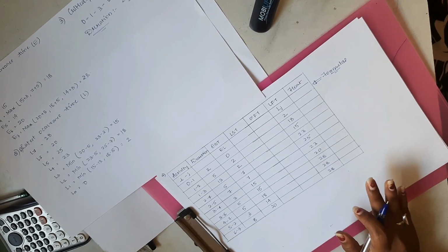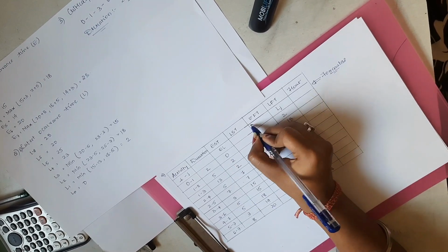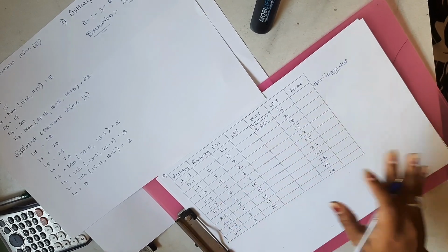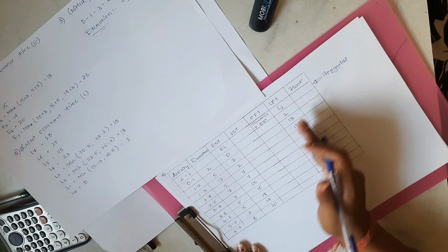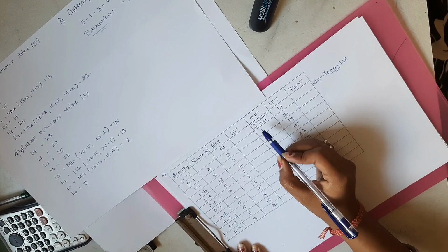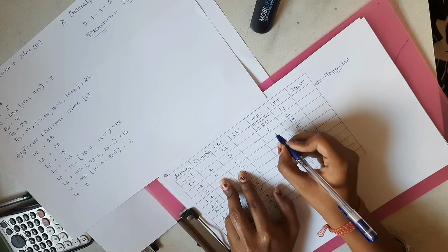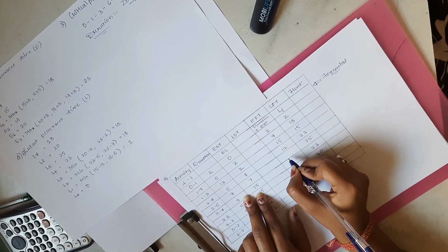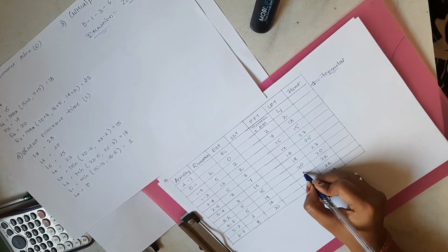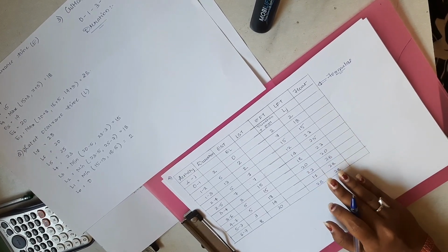Now next we need to look on EFT, and the formula for this would be simply duration plus EST. So this is the manner in which you need to go. First you need to fill these 2 columns using EI and LJ. Then the third would be EFT, where it is simply the addition of duration plus EST. So just simply add them: 7, 15, 12, 14, 18, then 20, then 23, then 17, and then 28. So this is how this column is also done.